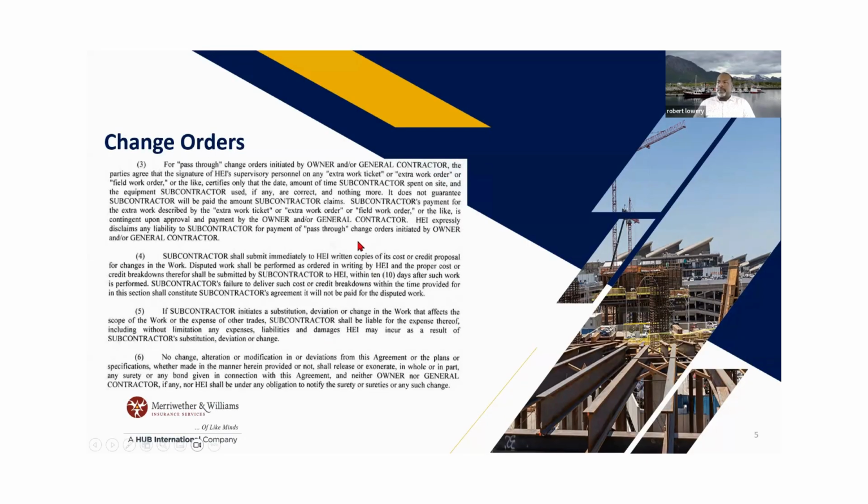And there's just some more language about the change order process. Now, sometimes in these contracts, you'll see that it could say no change orders, no alterations, no modifications. But if the owner or the design team comes back and makes a change, then you're entitled to a change order because they're making a modification to design in your scope. So that's one thing you have to be aware of.